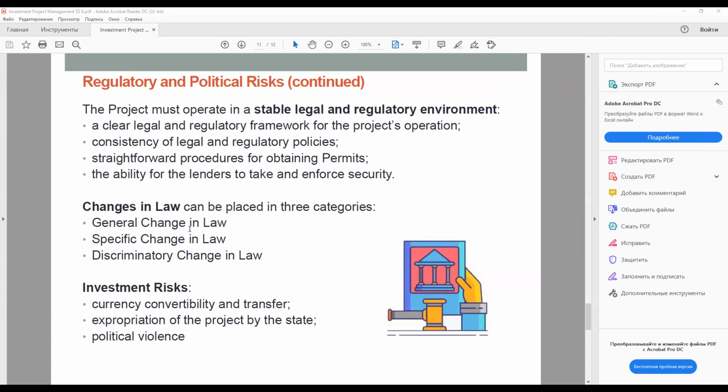This relates to laws or regulations which are specifically aimed at the project company, the particular project, or all projects of this particular type. If the costs of the change in law are to be covered by your offtake contract, this is treated as a compensation event. There is no need for change in law provisions for building service contracts, if such changes are automatically covered by benchmarking, market testing arrangements, etc.